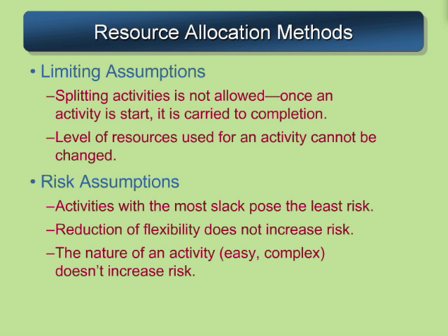There's lots of penalties and problems why you might want to split activities. You do those at your own risk and peril, and we'll talk about multitasking and splitting activities later in this session. We'll also assume that once we start work, we can't add more resources to that particular activity.